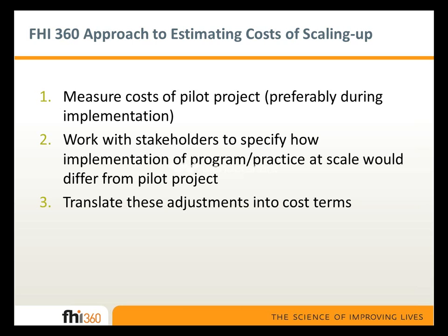FHI 360 has developed an approach to estimating costs of scaling up that is really quite simple. First of all, we know the best evidence about costs relevant to scale-up comes from the pilot project itself. So we measure costs of the pilot project prospectively during implementation. That's the preference. Secondly, we work with stakeholders to specify how the implementation of the program or practice at scale would differ from the pilot project, and we'll talk more about this later on in the presentation. And finally, we translate these adjustments into cost terms.